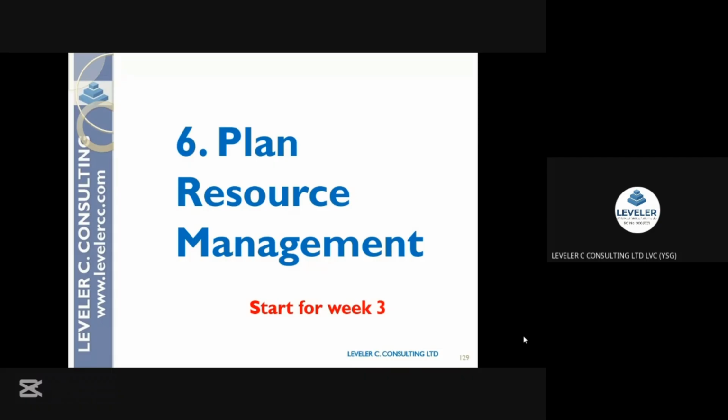Let's say, for example, my own project is project C, and Zainab is involved in projects A and B. So I need to find out when Zainab is going to be available for project C, meaning when she's not busy with project A and project B. When you put all of these things together, you come up with a timetable we call a resource calendar. That resource calendar tells me when Zainab is going to be available on my own project, which happens to be project C.